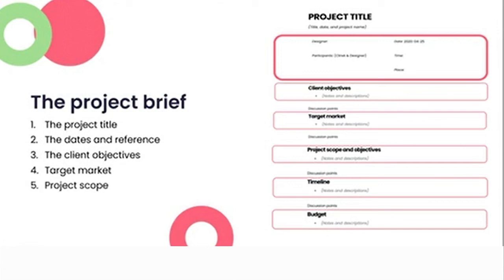Next heading on our project brief is our project scope. It is the designer's responsibility to develop a concept and as-built drawings for the contractors. This is something that you would indicate on your project brief. In this instance, let's look at an example of the scope that may take place. So we would definitely have demolition of existing space. I would indicate additional new drywalls. We would put an indication in for doors, new flooring, lighting, and electrical points where applicable. I would also include that all joinery and specifications would be detailed up in drawings drawn by the designer.